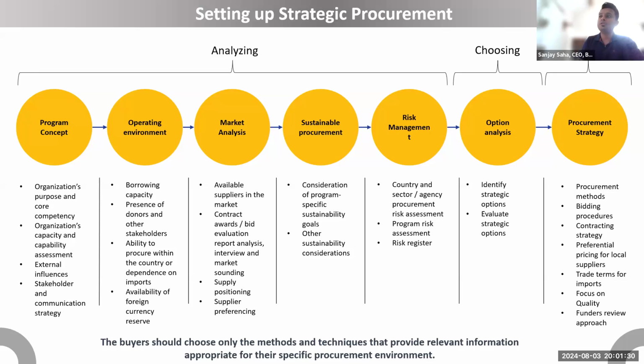Then you can also add some timeline for demand planning, which is your quantification step. So maybe another 3 months you can add for a detailed demand planning, for a long-term demand planning, say 2 to 3 years. So it's already about 1 year.